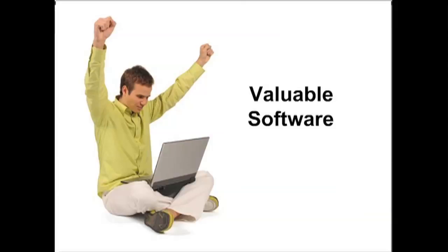If we had used the traditional waterfall of BRD, we would have absolutely put this item in for multiple languages. We would have developed it because it was in the requirements document, and it would have been delivered. But in its place, another feature of higher business value would not have been done, given the same constraints of scope and timeline. So that's just an example of how using stories, using Agile, using the product backlog has really helped us focus on creating the most valuable software.